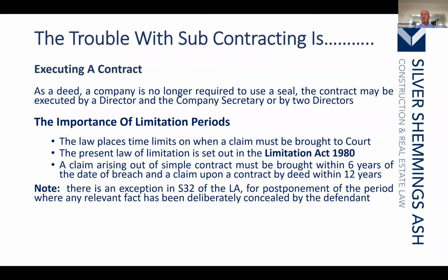What does it mean, though, to commence action? Well, it means to commence and issue a writ, for example, or an arbitration notice, or in theory, an adjudication notice.